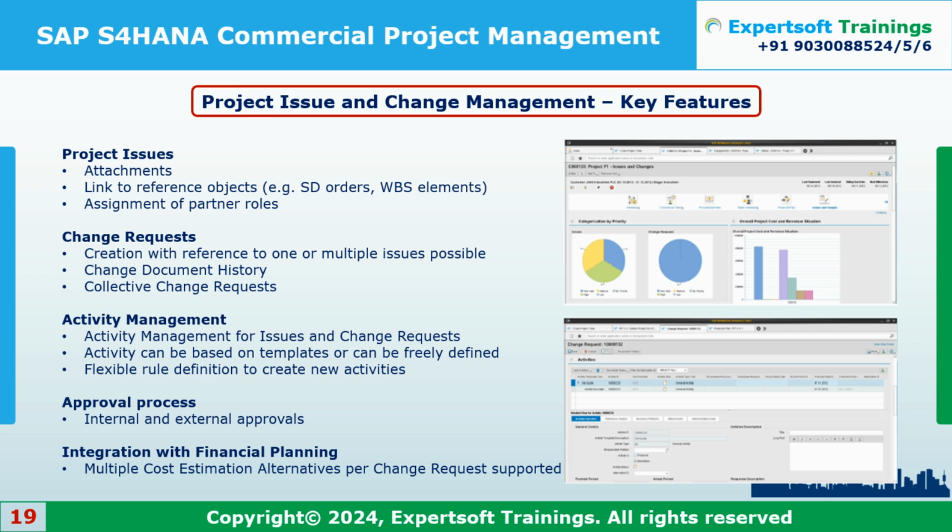It will not be a part of the total cost plan, right? The total cost plan will still be 1 crore rupees. So my SOW value got changed, right? He will go and manually change it. It will not automatically update. If my estimation is 20 lakh rupees, it is increased by 20 lakh rupees, it will not update the cost plan. I will go and manually update that. Still I'm not getting what manually means.